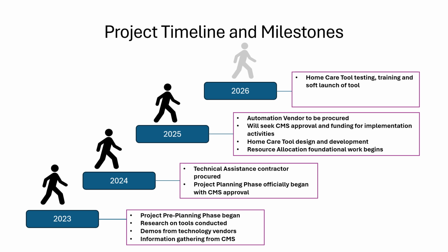The purpose of the soft launch is to test the tools in real assessment situations and be able to identify technical or programmatic issues and resolve them before fully rolling out the home care tool. The soft launch period will also support the need for SDS to gather a year's worth of assessment data to build resource allocation for the HC tool.